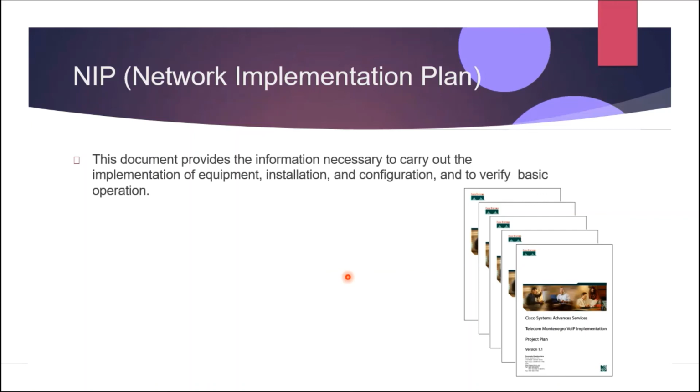So after the implementation plan review, the network design validation and testing is also a good practice. So the goal is to identify any interoperability issues faster and with proven testing processes before sending the equipment to the field sites. So you have to do it remotely or on-site. So the network design validation and testing service leverage the network implementation plan to build, configure, and test system at any location. So based on the document test plans and laboratory topologies, because you have to simulate it before you implement it. That's a good practice in network design.